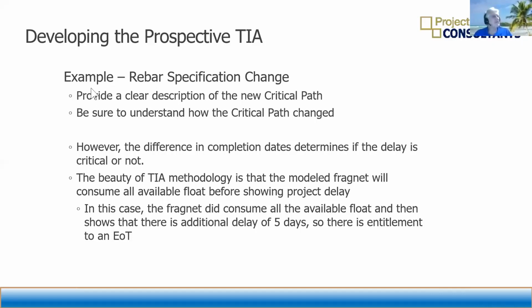So now, we've got to be sure we have a clear description of the critical path and how it changed so we can discuss that. But the process works whether you do that or not. And the beauty is that it does go look around, and if there's available float in the right path, it'll use all that up before it starts to show project delay. So it's a pretty efficient setup. In this case, it did consume all the float and then showed there's an